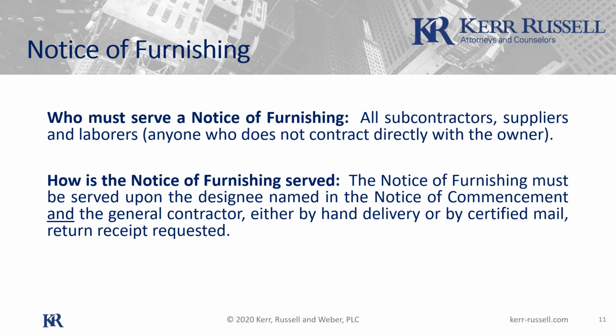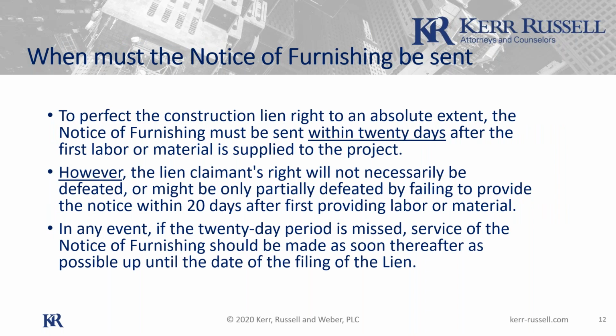And then how you serve it, you have to do it by hand delivery or certified mail. Okay, and next slide, please. Okay, and here's the kicker. You gotta do it within 20 days of the first work.